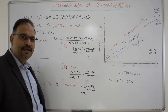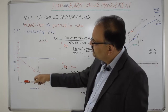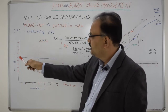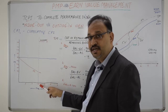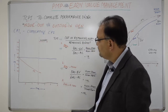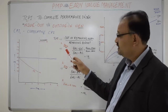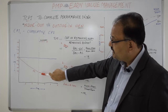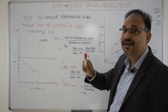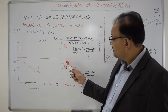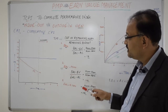Now let's interpret these results using a graph. The x-axis represents the six-week project timeline, and the y-axis represents the cumulative CPI. The blue line shows the cost performance baseline at 1.0, and the dotted line shows the current project status at the end of week three — CPI at 0.6. In the first scenario, where the project wants to achieve the original BAC, the required TCPI is 1.8. That means the project must lift its performance from 0.6 to 1.8 for the remaining duration — a gap of 1.2 — which is quite unlikely.